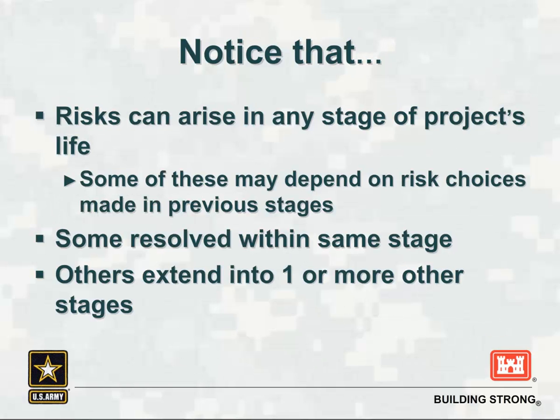So here are a couple things you might notice about the risk during a project life cycle. Risk can arise in any stage of the project's life. Some of them may depend on risk choices that were made in previous stages of the project's life. Some risks can be resolved within the same stage. Others extend to one or more or even all of the stages of the project's life cycle.